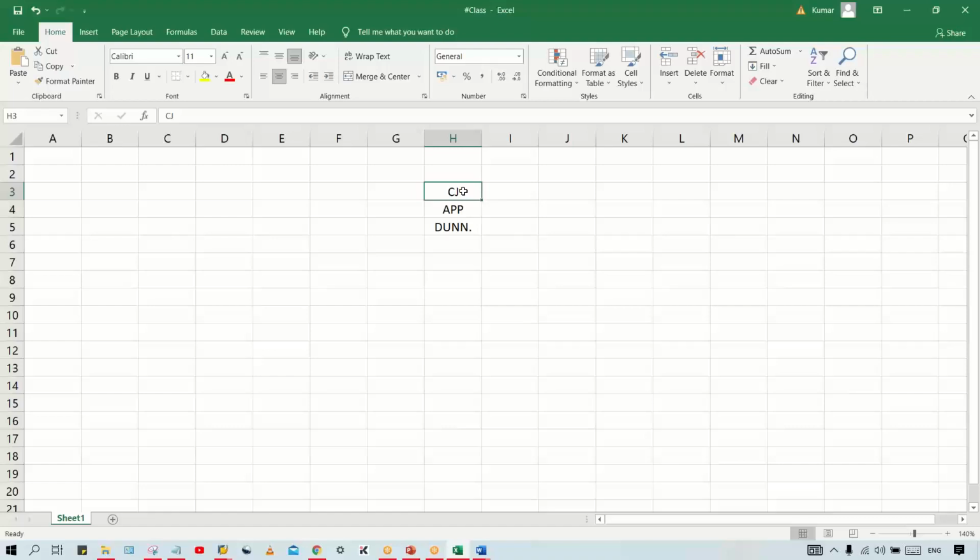So project manager simply will say, okay, if configuration is done, then what about the unit test, is it completed? If you say yes, it is completed, then kindly send me the unit test document, right? So he is going to check just the unit test document. He will see that yes, that testing is done and it is executed successfully. So it means configuration is done, right? So this unit test document is generally going to be prepared for what, guys? It is for internal reporting,